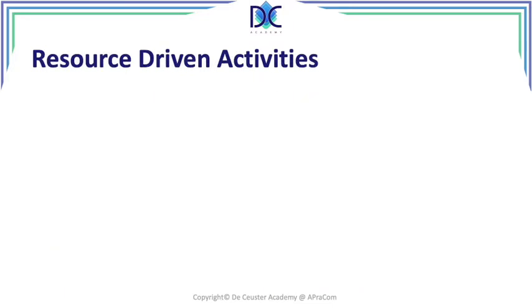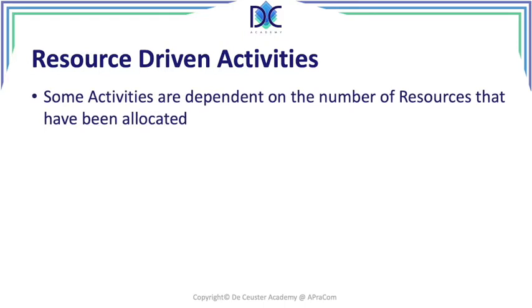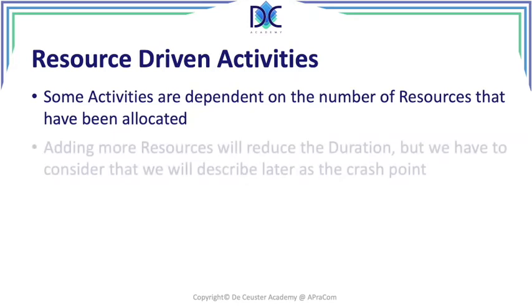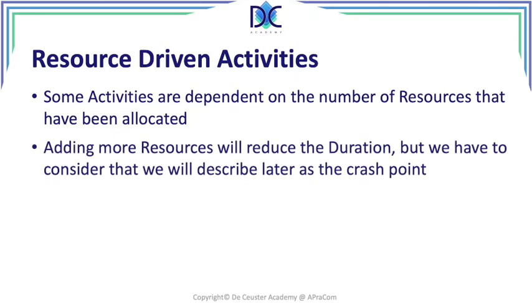Now, when we look at resource-driven activities, here it is a little bit different. Here, activities depend on the number of resources that have been allocated. Adding more resources will reduce the duration, but we have to consider what we will describe later as the crash point. So the crash point is a very important element when we are adding resources to activities.